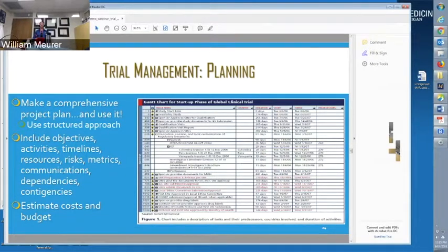Gantt charts can be potentially helpful. Many grant submissions now have a spot, particularly for clinical trial submissions, for the study timeline. The more tasks you put onto that, the more useful this planning activity is, because grant reviewers will look at a relatively simple study timeline, like I'm going to do regulatory for a few months, and then this for a few months, with some degree of thoughtfulness. But when you say I'm going to be doing all of these specific tasks at these times, that can give you a leg up, and that can be part of the clinical trials NIH applications in terms of the study timeline. That's a new attachment in that clinical trials section.